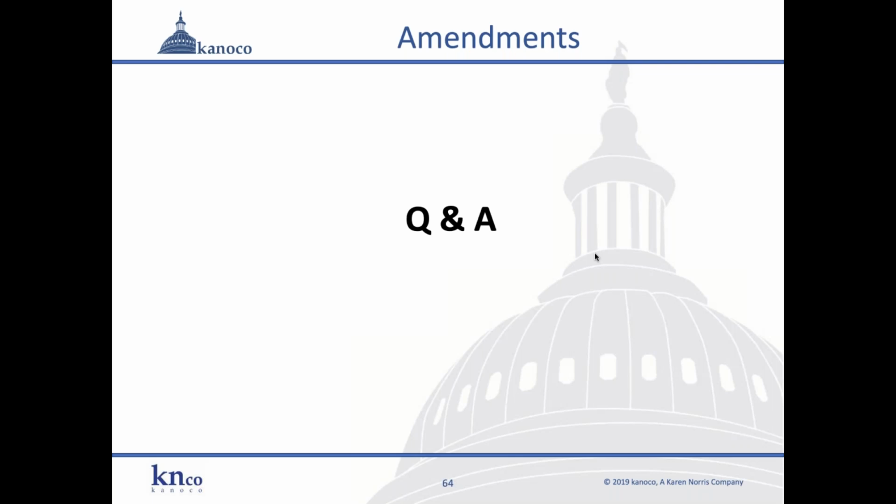And the guidance language is silent on the need to send an awarded agreement. It doesn't say they have to send an award agreement. It doesn't say they don't have to. It's just silent. So 30 days for your response is a practical amount of time to receive a response and approval for the amendment. The holdup is how long it takes to get the award agreement, the amended agreement.